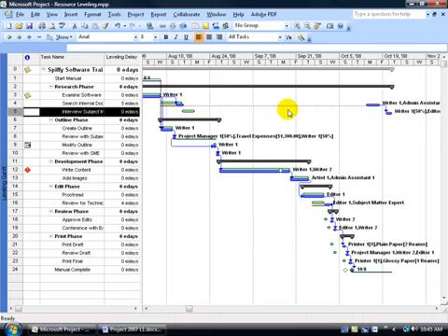It doesn't give you the flexibility to say, well, I don't want Writer 1 to be working on this second task, I'll have somebody else. Or I'll increase their overtime hours, so they finish this task a little bit early and start on the next task and still try to keep within the timeline of the project. So because of that flexibility, I don't use it, but you may find that it works for you.